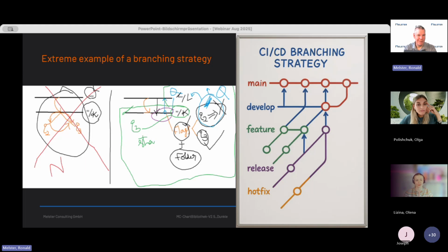in the project. Then 2 things happen. This mail becomes a configuration item, so it will be part of the item list according to SUP.8. And the mail is planned by having some kind of communication matrix. And if this email is sent according to this communication matrix, then it would become a communication evidence.